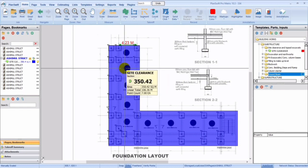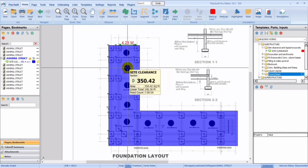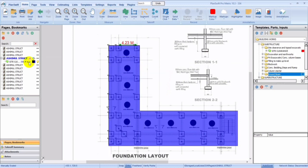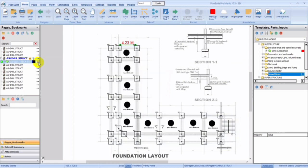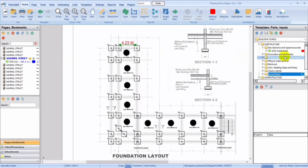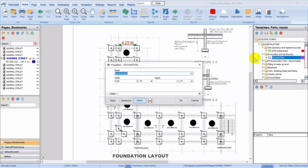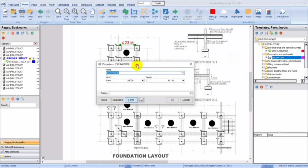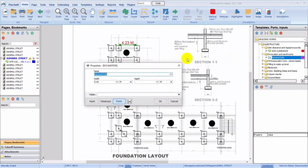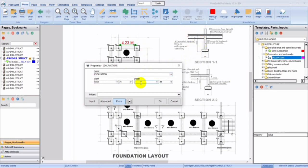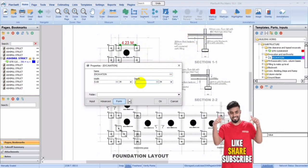So let's again, you can just click on this to remove it and then let's go again and just calculate for trench excavation. So you click here and then as I said, you click on this button. So first thing you're going to do for this is that you're going to input the width. The width here already is 690, which is 0.69 meters. And then the depth is 1,500, which we are going to input as 1.5 meters.